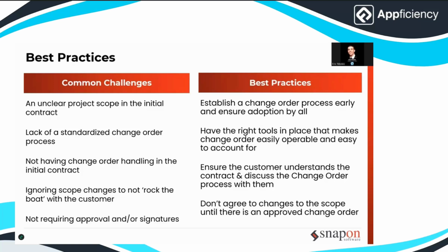But if we get back to the actual contract itself, it's essential to review the change order language in every contract before signing. Look for sections that dictate how changes must be submitted, what backup is required, what markup is allowed. If you're on the receiving end of a contract, that's your opportunity to negotiate fair terms before you're locked in. And a best practice here is to assume there will be change orders, because there almost always are, and to align on the process ahead of time.